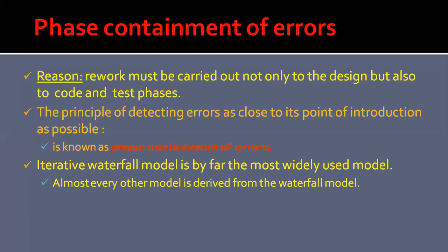It may not always be possible to detect all the errors in the same phase in which they are made, but errors should be detected as early as possible. The principle of detecting the errors as close to their points of commitment as possible is what we call phase containment of errors. So for achieving phase containment of errors,